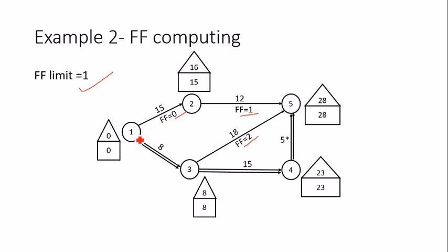compress. So the same critical path is there, 1 to 3 to 4 to 5, and on this path I have 3 activities, but only 2 are available for crashing because this one has already reached its crash duration. So this time I have to decide out of these 2, the 1 to 3 activity and 3 to 4, which one will be chosen.